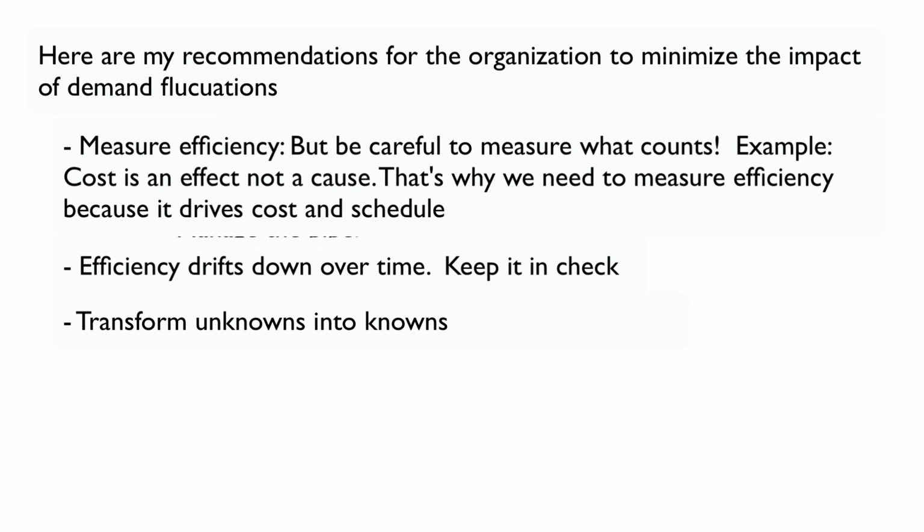Now, we also manage the pipeline of projects to prevent exceeding capacity. But it's also critical to manage the number and type of projects in the pipeline. For example, if you have too many high-risk projects, they can suddenly consume the entire company. I've seen this happen more than once. So spread the resources out across improvement projects, platform upgrades, and new products or services. There's also a special recipe.